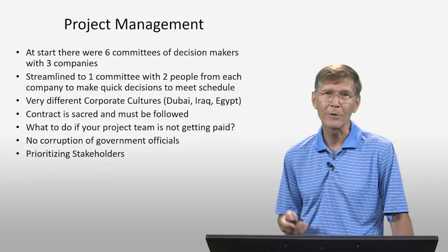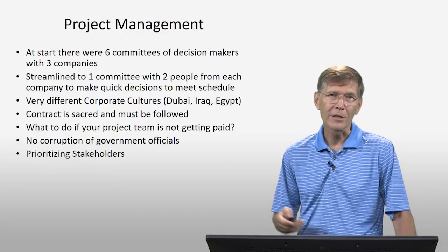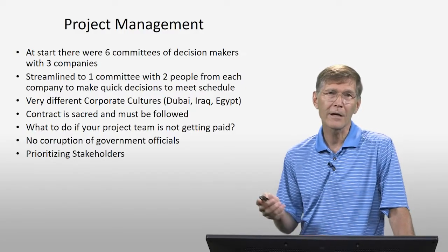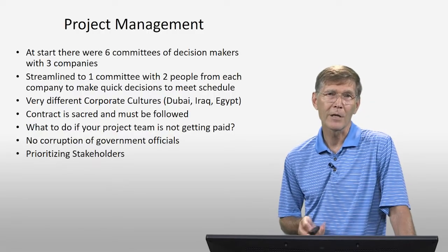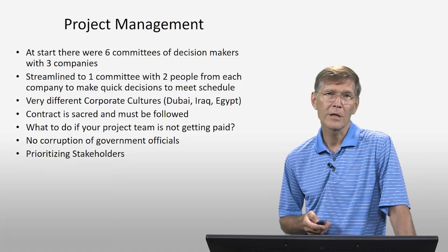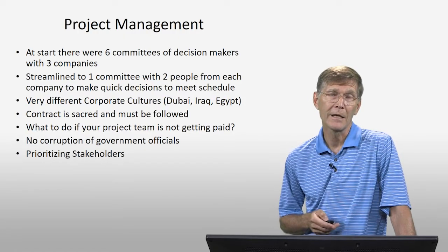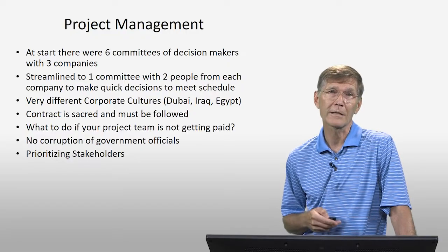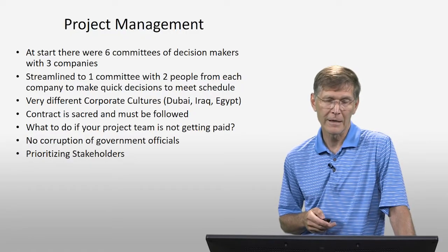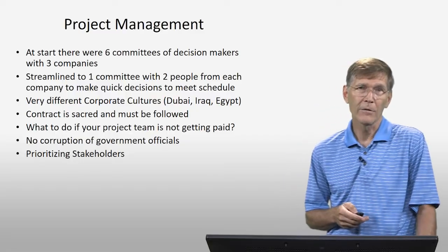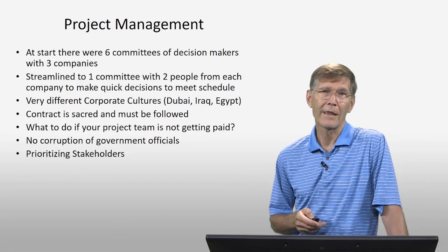I mean, we had a legal committee, we had a land committee, we had a budget committee. I mean, they had all these different, and I said, look, it's not going to work, and if you want me to stay as your project manager, we need 1 committee, and I'll take 2 people from each company, and you have to figure out how to deal with your company on the other side, but that committee is the committee I'm going to talk to, and that's the committee that's going to make decisions. And it took a little while, but we got consensus on that, and that really helped.